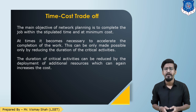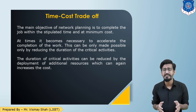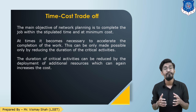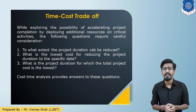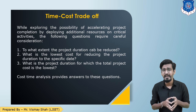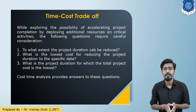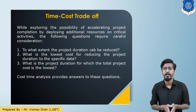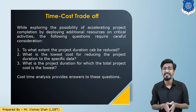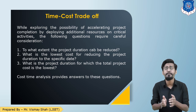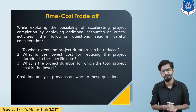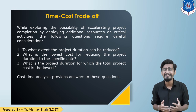When we are trying to accelerate the project by deploying extra resources, following things should be considered: first, to what extent a project duration can be reduced; second, what is the lowest cost at which the project can be reduced to a specific date; and what will be the total project time for which the total project cost is lowest. This time-cost trade-off analysis will help you answer these questions.